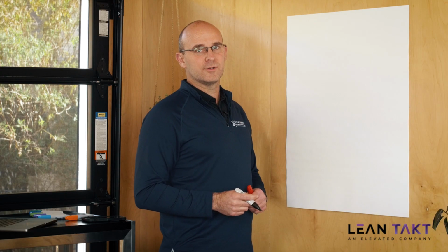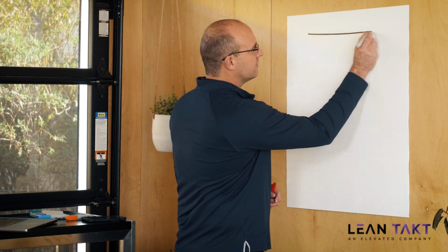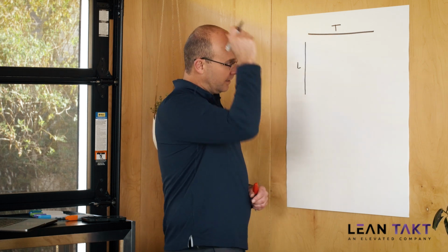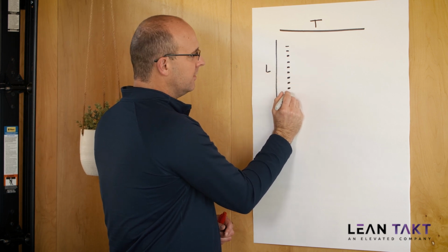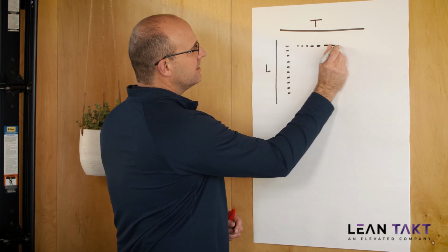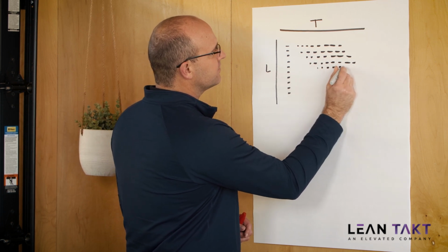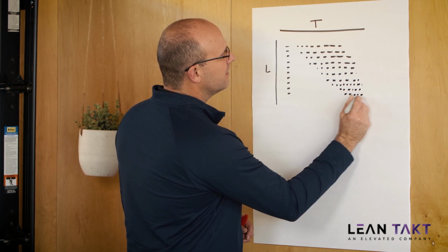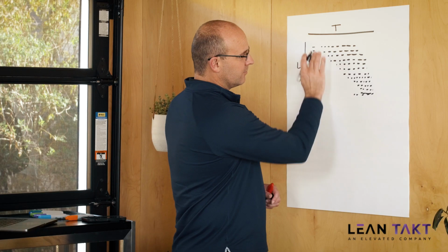There was a project that was in trouble about 2/3 of the way through. A really proficient scheduler and I went to the project site and we organized their schedule in a time by location format. Once we knew what their main zones were, because they did have zones in the actual CPM schedule, we found that they had sequences and it was going okay for the first 2/3 of the project, but then at the end, it started to do something like this, right? It started to really stack here at the end. Forgive my sketch, but it really stacked at the end.